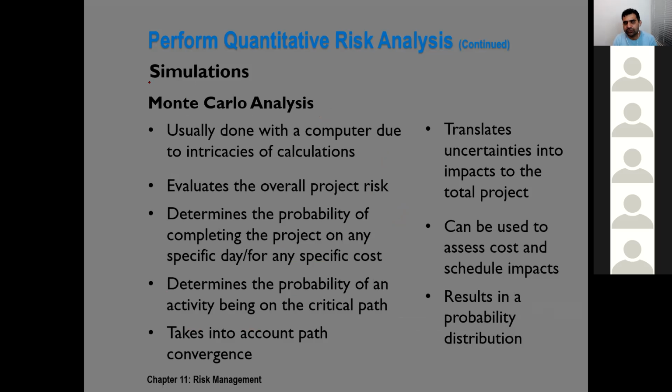Another technique that we use for quantitative risk analysis is Monte Carlo analysis. It is just like playing in a casino. We do the same things. We run Monte Carlo simulations again and again to get a realistic outcome. What happens is, once we have schedule, once we have risk-related activities, especially if our schedule is based on 3-point estimate. You remember 3-point estimate? Optimistic, most likely, and pessimistic.